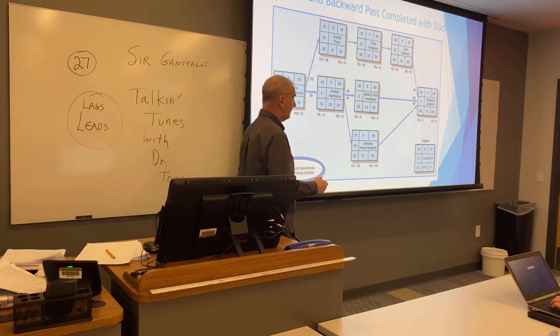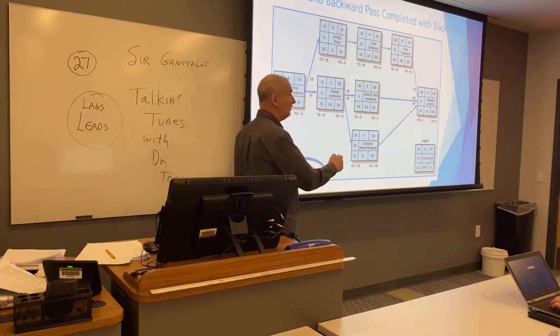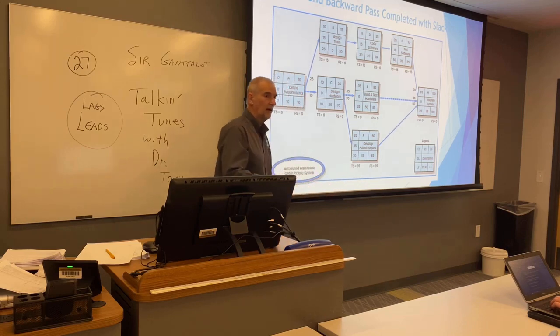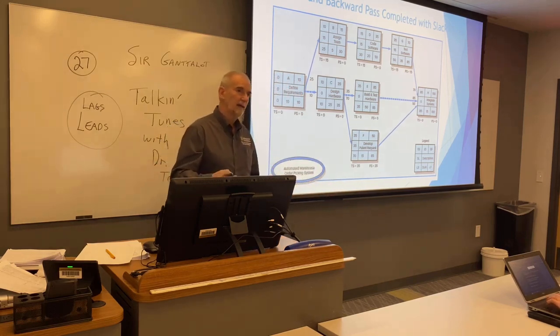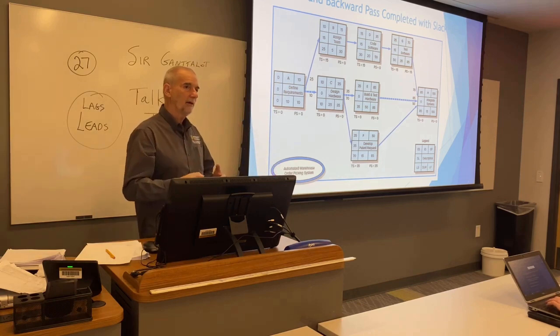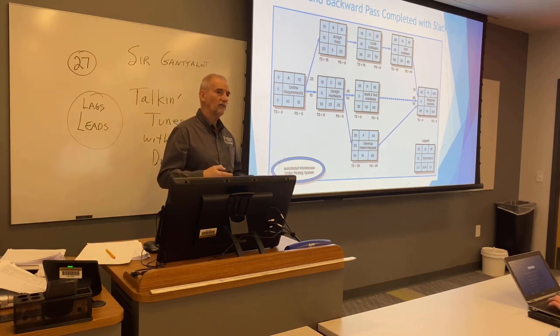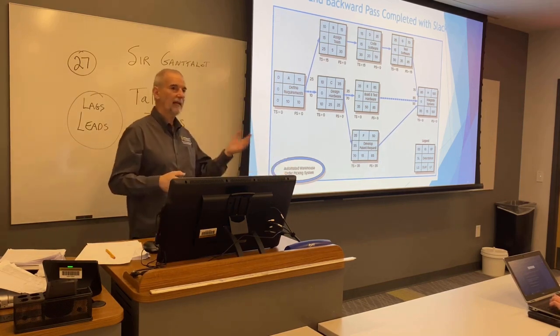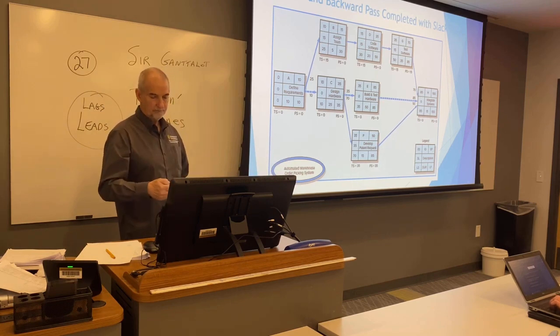And this is going to take 115 days because it's 15 plus 100. So then this becomes a new critical path. You see that? So if you exceed the amount of slack on the path, those non-sensitive paths can now become sensitive.